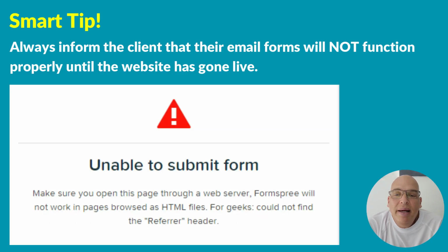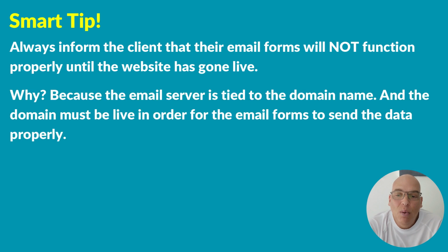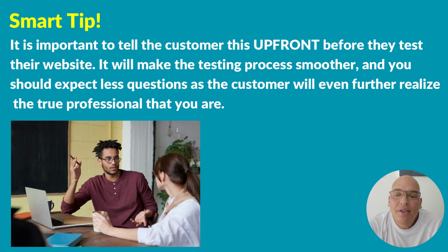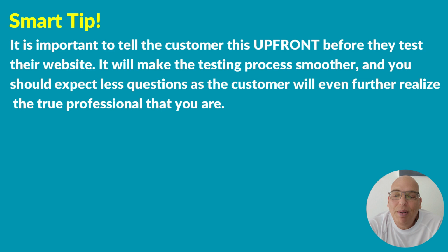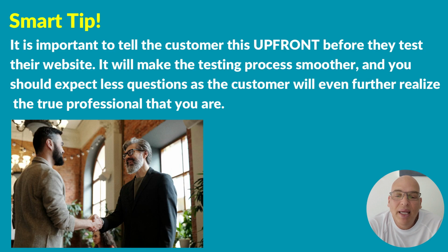Always inform the client that their email forms will not function properly until the website has gone live. Why? Because the email server is tied to the domain name, and the domain must be live in order for the email forms to send the data properly. It is important to tell the customer this up front before they test their website. It will make the testing process smoother, and you should expect fewer questions as a customer will even further realize the true professional that you are.